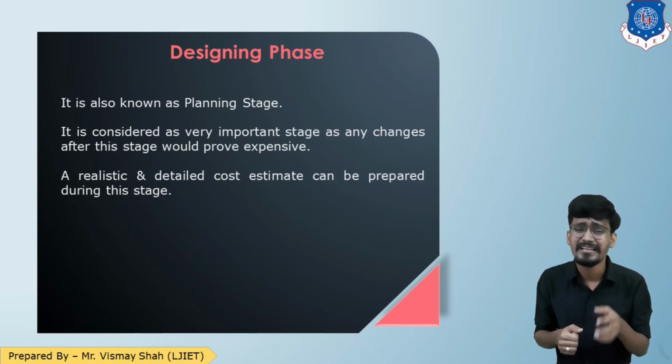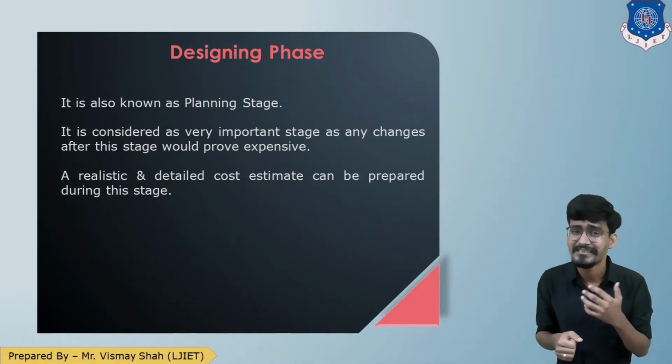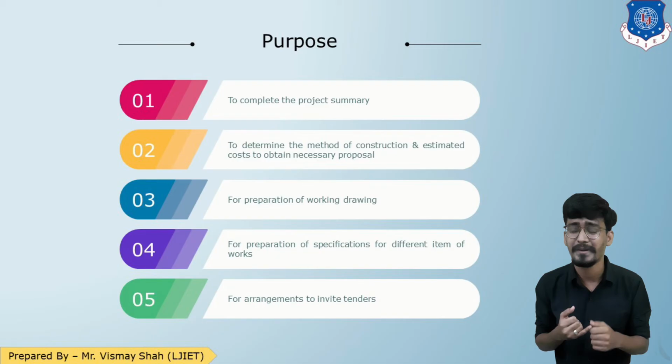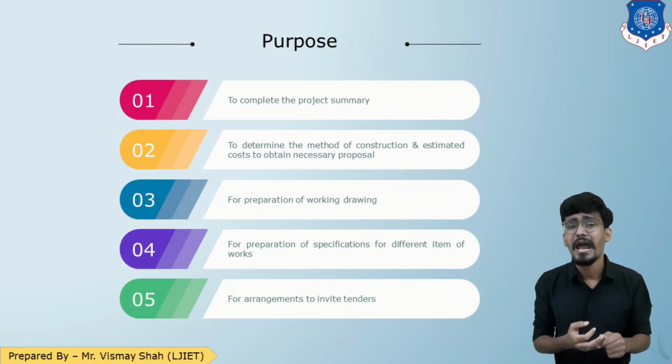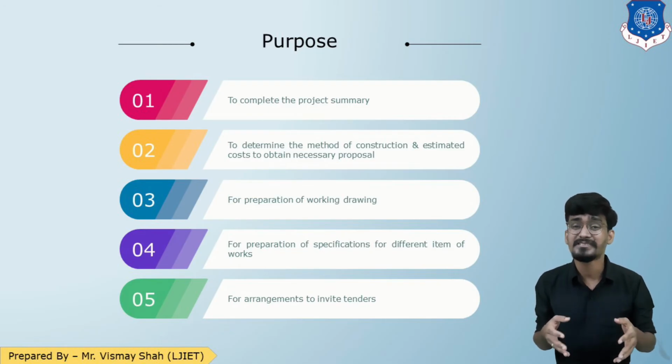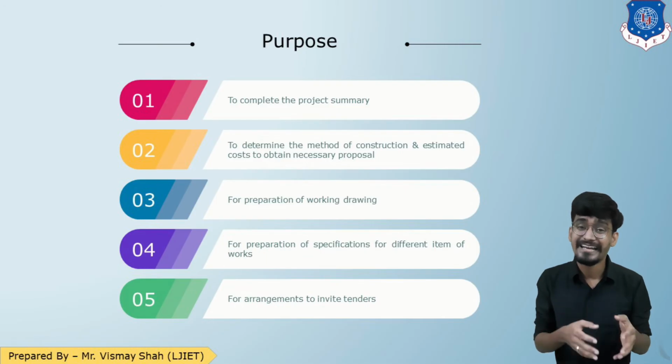Now let us see the purposes of this stage. The purposes of this stage are to complete the project summary, to finalize the method of construction and the equipment, to prepare the working drawings for the project, to prepare the specifications of the different items of work, and to make the necessary arrangements to invite the tenders. So these are the purposes of the designing stage.